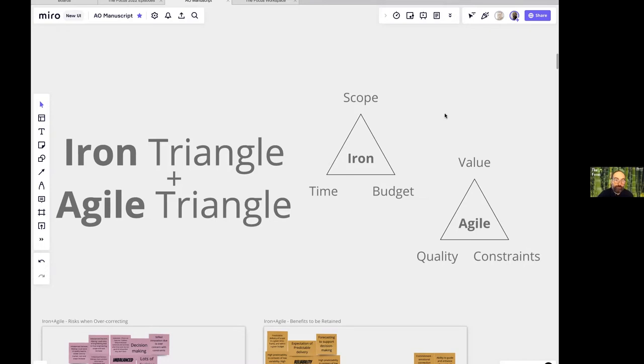So for instance, when we're chartering teams, we talk about assessing risks and issues and assumptions and dependencies, and sometimes even opportunities in addition to constraints, because all of these can become constraints. A risk, when it materializes, may become an issue. That issue, if it becomes acute, may become a constraint. An assumption, if proven false, can become an issue, which then may exacerbate into another constraint.